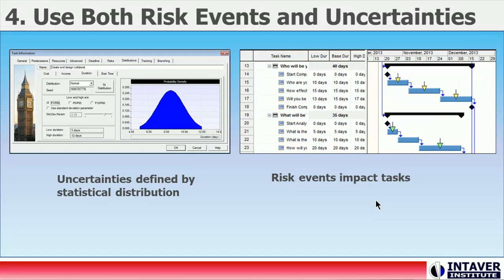While this adds more complexity to the model, there are some tools and processes to minimize your effort without sacrificing accuracy. Uncertainty bands allow you to distinguish levels of uncertainty that automatically calculate estimate ranges based on historical data. Risk events can be efficiently assigned to activities using drag and draw, eliminating much of the detailed work previously required when assigning risk events to schedules.